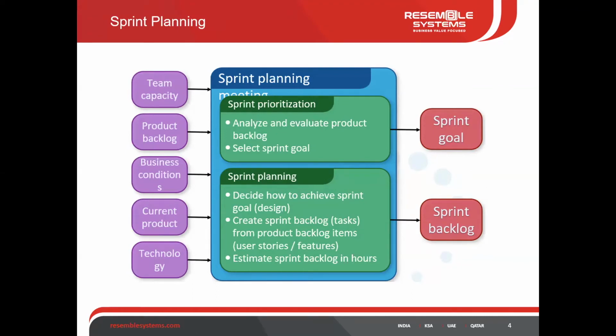Sprint planning is nothing but this: you have a product backlog, or list of features for the complete application, and the product owner should decide what should be prioritized, or planned to roll out as the next feature release. I will take the same example of the leave request application. Initially the HR might say, let us have a system where they can log in and apply for a leave. That's a valid thing, and very important for any leave request application.